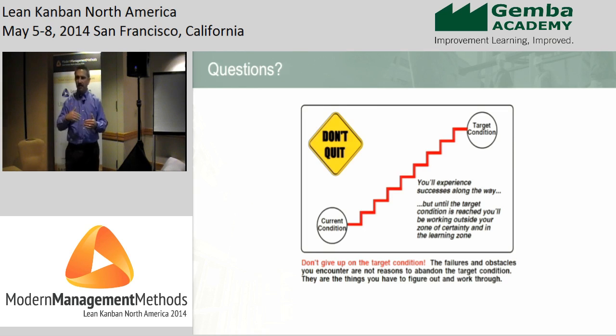So let me back up a step and then move forward. We also have studied Alcoa, and what we decided was the path in. Remember that what they found at Alcoa is if you were going to make the work safer, you actually had to understand how the work was being done. Part of the way that we've tried to attack that is actually through quality, because most construction workers don't plan at the process level. They just go do the work. And so we have a whole other program that we call our built-in quality program that really is an effort to get the workers to think about how the work is being done. As a component of that planning, we're also layering in safety.